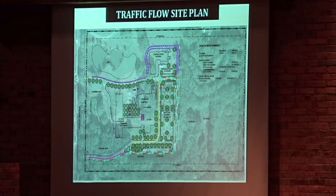They've also been working with Public Works and Fire to make sure that water issues have been addressed, as well as wellhead issues. Clarification on the wetlands area that's in the southeast corner of the project has been added. We do know that that is classified as a wetland, and if anything does get close to that, they'll have to work with the Army Corps of Engineers on a specific 404 permit for that area.